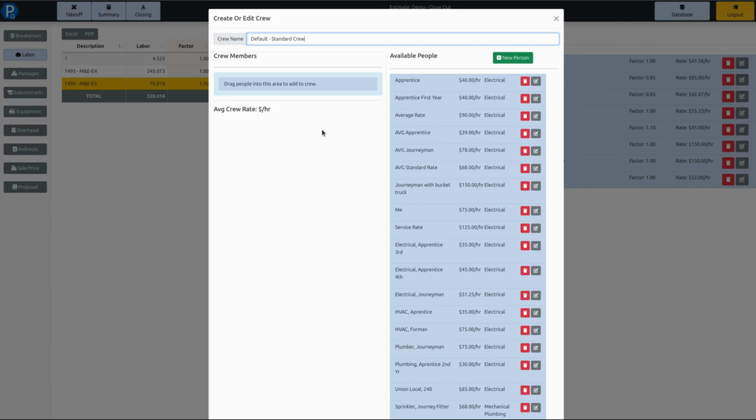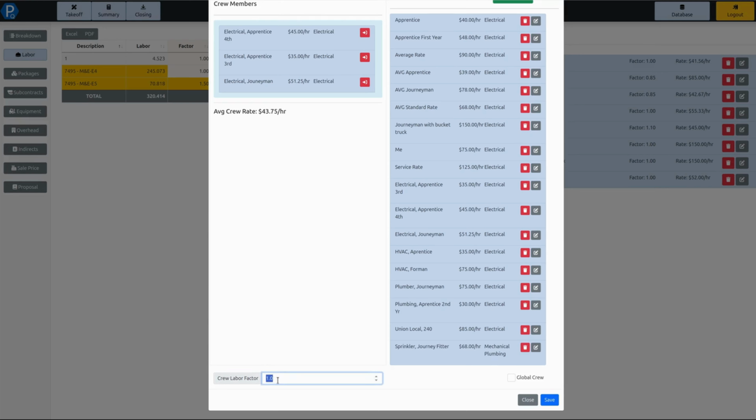Down here, we have a crew labor factor. Now, this is important for if this crew is going to be doing things like night work or overtime work or those sort of things. But for our standard crew, we're just going to leave this at 1.